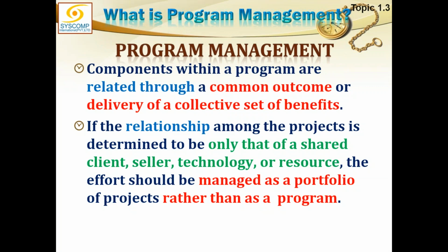A program has to have interaction and relation amongst its projects. Just simply having them for a shared client or a seller or a technology or a resource does not qualify it to be called a program. You may like to call it a portfolio or a sub-portfolio, not a program.